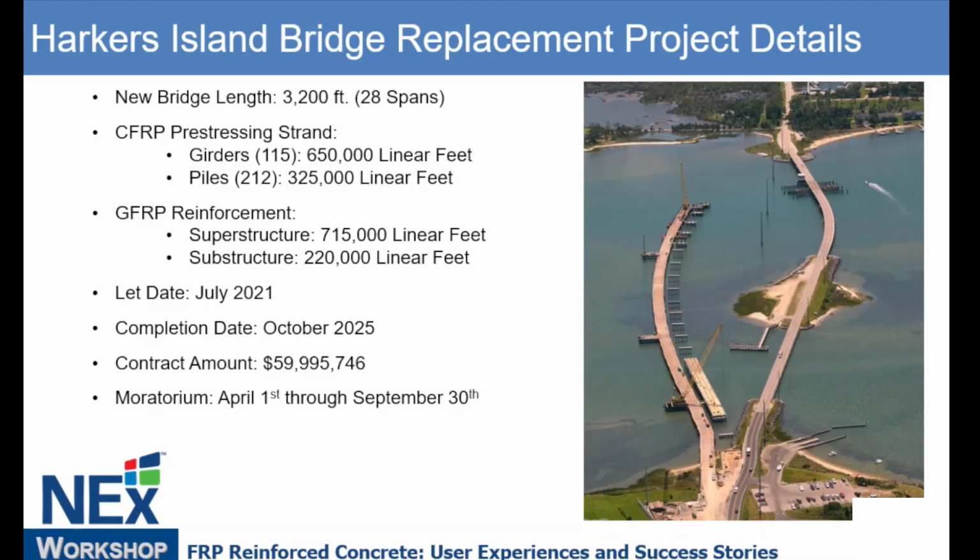What you're seeing along the left side here is a temporary trestle bridge. This is a very shallow site. The water draft in some areas is less than 3 feet. And so you couldn't use barges effectively for most of this bridge. Here you can see a public boat launch. To the left here and right on the bottom is actually the field office site.